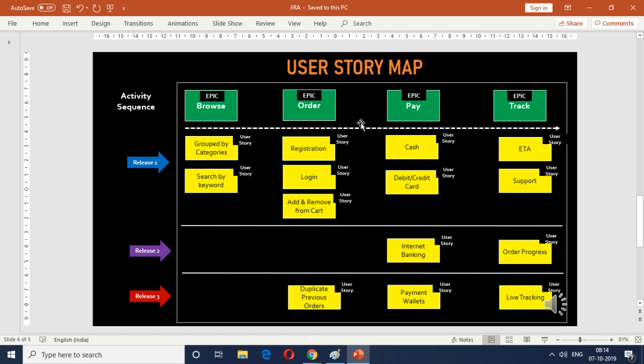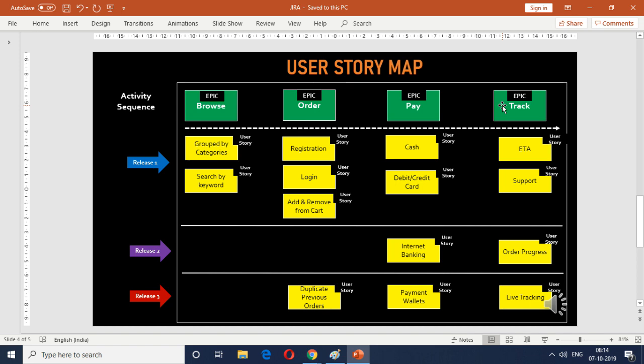So we did the exercise and there were four key epics which were identified: the ability for users to browse the online menu, the ability for customers to make an online order, an ability for them to pay for their online order, and then the last one was track their online order to delivery. So these are the four key epics which we came up with as part of this user story mapping exercise.